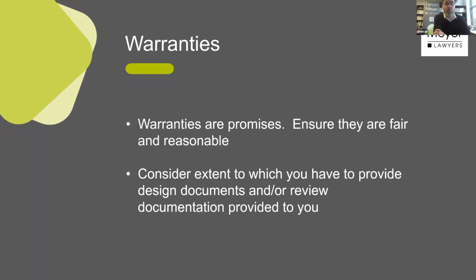a little section normally called warranties, and it'll usually say that you as the contractor agree that your works will tick certain boxes. You'll see certain warranties, like that the works will be done with due care and diligence. Well, that's fine. You never take issue with something like that, because that's your obligation as a matter of law, regardless of what the contract says. Your base level warranty is going to be due care and diligence, and that really often covers the field. That's really often all anyone ever needs to provide.